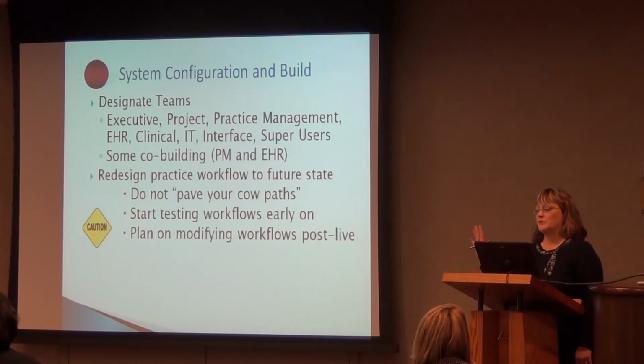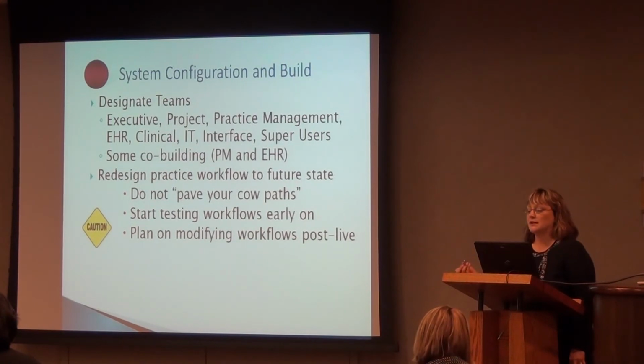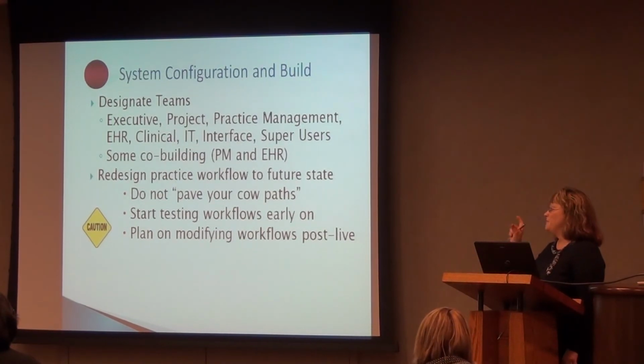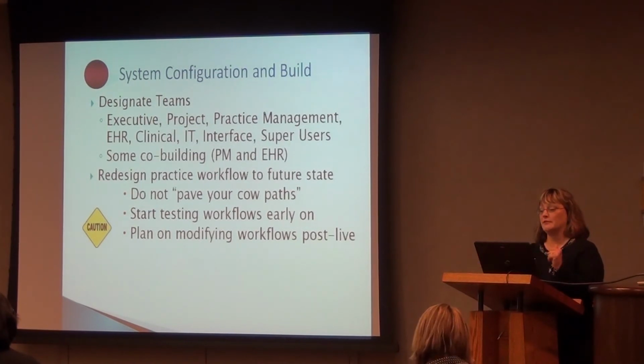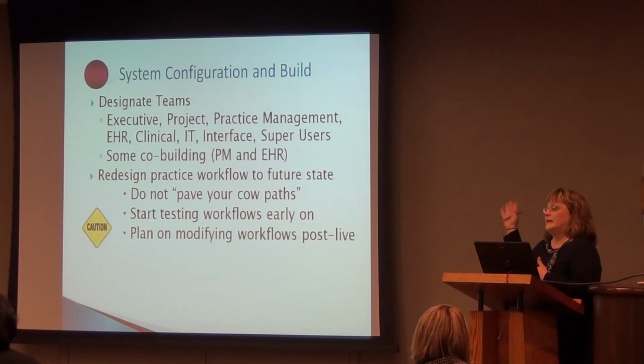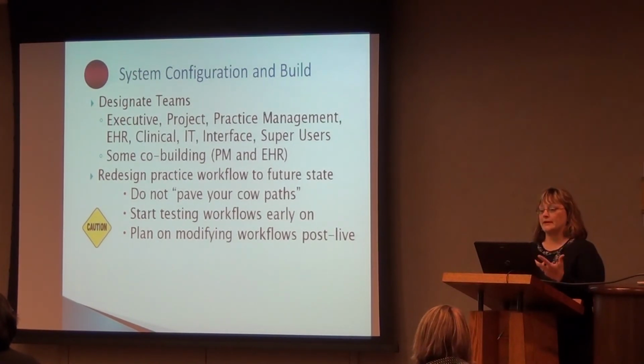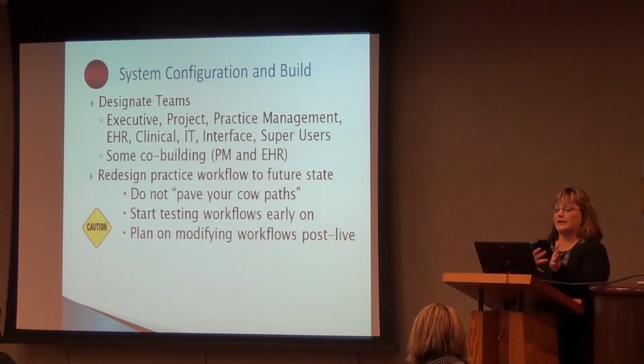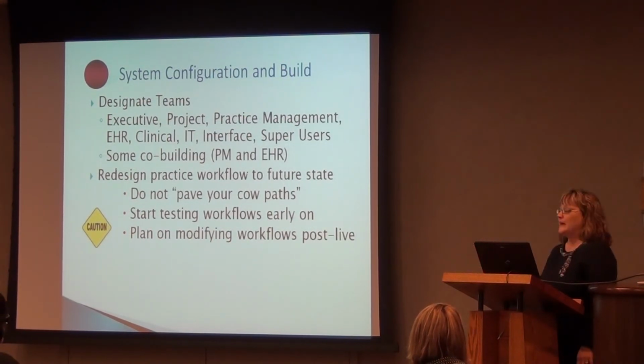MedLS has recommendations for what you need for the system configuration, and you can accept those or say no. For our practice, we want to make an exception on those and start testing your workflows early. When you think that you are going to collect a copay now in EHR world, when the patient checks in and you're going to scan their license and their insurance card, you want to make sure you test that process. If the patients start coming in and you're asking them for the copays on check-in, which is best practice, and the patients start saying, I don't want to pay the copays, you've got to be able to quickly change that post-live. You may say, wait a minute, Mary, forget it, we're going to go with the checkout process. And you have to do that quickly.